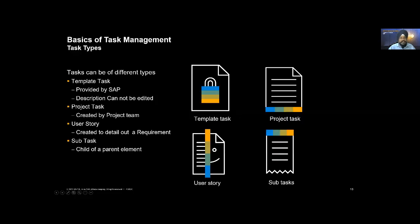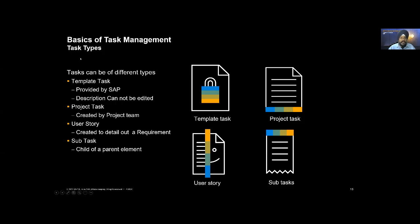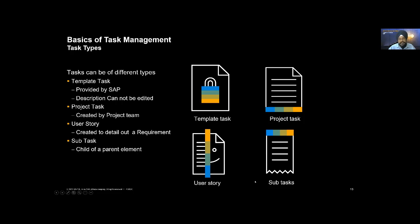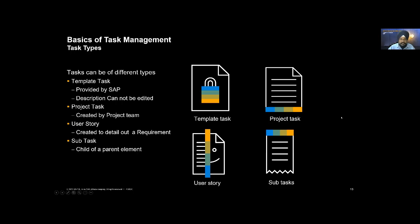But that's not sufficient. We also need to know how this task will behave. Irrespective of where it came from, how does it behave? Can you edit it? Can you delete it? Can you copy it? Can you break it down further? That capability is explained by something called type. What are the different task types we have? We have template tasks, project tasks, user stories, and subtasks. And why so many? Our goal is not to create confusion, but to give flexibility to you. You don't have to use all these types. But to do that, you need to understand the differences and when to use what.